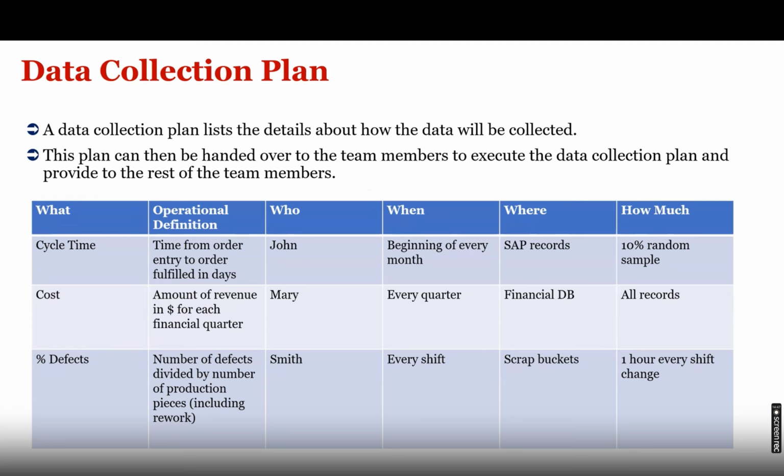The data collection plan ideally includes what data to be collected, who will collect the data from within the team, and by what date the data has to be collected. And the most important area, what I will focus on, is the data source, identification of the data source.